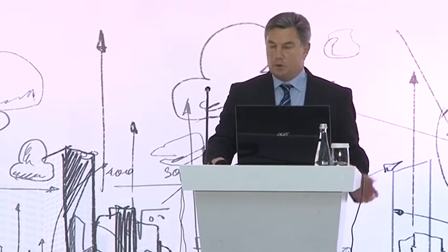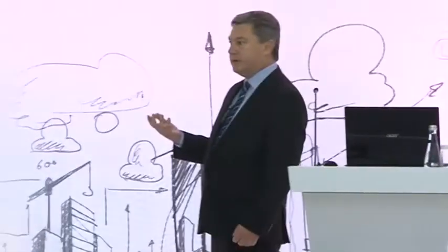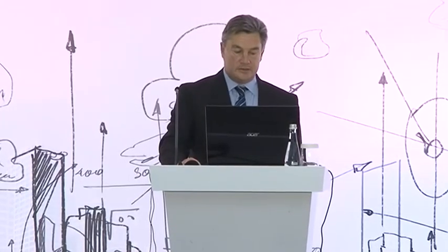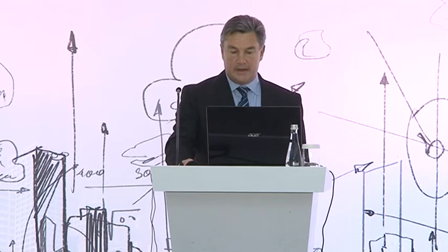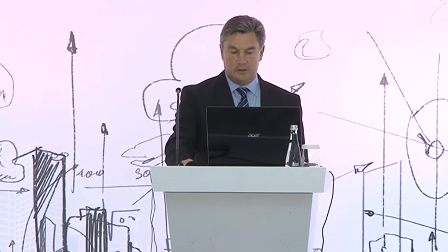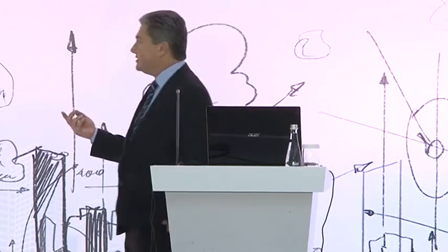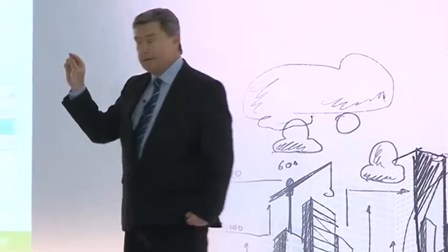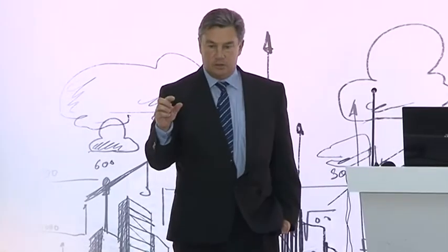Because I've imported all the project data, not only the data to create the curve, we can have a look at the activities as well. So down the bottom here, as I move my mouse along the curve, I can see the activities that are occurring. So that might help me to see, well, look, there's a gap there between the baseline and the target. So which activities do I need to concentrate on?